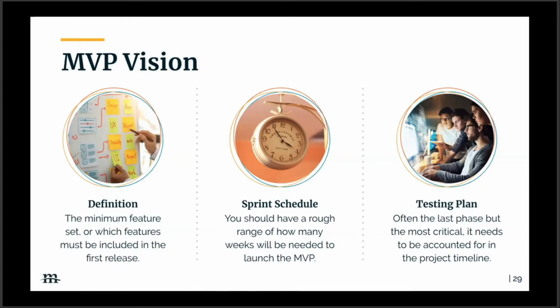Our budget tool that's inside the budgeting kit has default guidelines for how to assess estimating these user stories. And those guidelines are based on level of complexity. All the defaults, as we mentioned earlier, are derived from our agency's history of producing Agile projects. So what you'll want to do is plug in your epics, stories, project roles, and the budget tool will generate your project timeline and estimated cost.